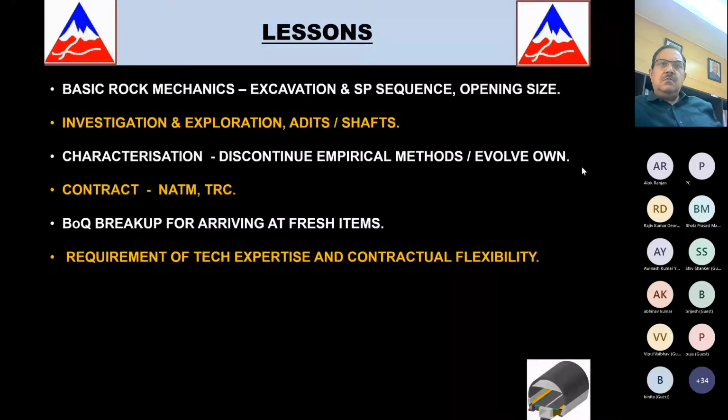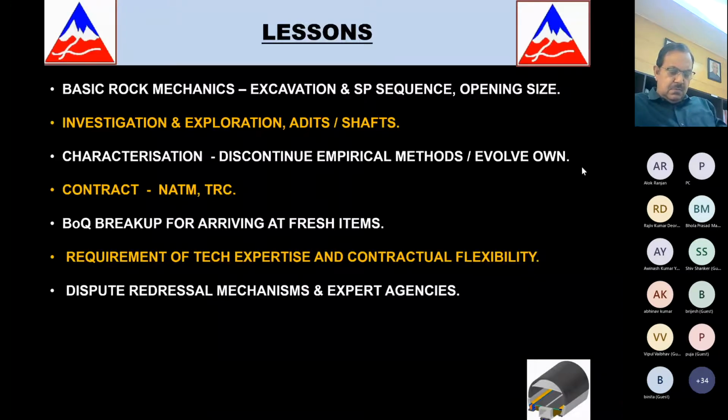I would always advise that wherever our own client team is there, there's nothing wrong in having an expert who is there to advise the client and to do these site meetings, so that the right approach can be taken to dispute resolution mechanisms. Expertise is extremely important, because most of these projects get stalled more because of contractual issues and less because of technical issues.